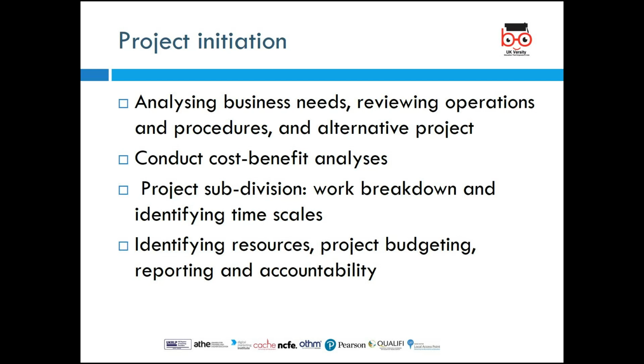If you choose any alternative project, we need to design what is called a work breakdown structure. What is going to be done in the first phase, the second phase, the third phase, and identify the time frame for each time scale. So if you have phase one of the project, phase two, phase three, phase four, phase one is going to be how many weeks or months or days? What about phase two? What about phase three? What about phase four? So you will have project subdivisions with a work breakdown structure for every phase and the time scale associated with every phase of the project.